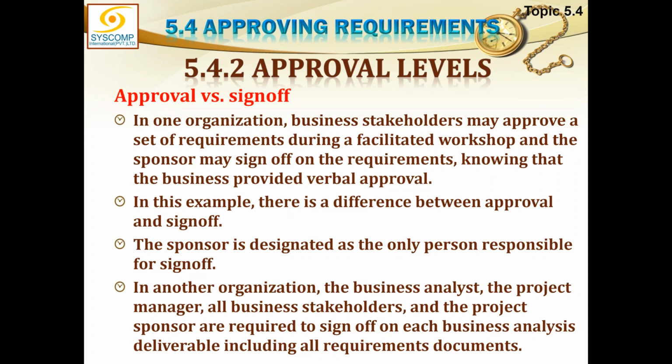In this example, there is a difference between approval and sign-off. The sponsor is designated as the only person responsible for sign-off. In another organization, the business analyst, the project manager, all business stakeholders, and the project sponsor are required to sign off on each business analysis deliverable, including all requirement documents.